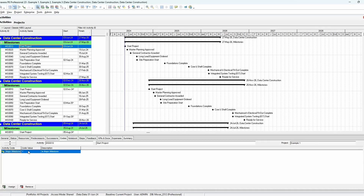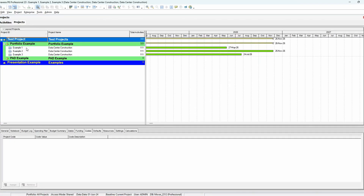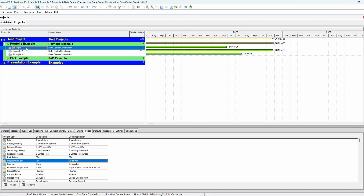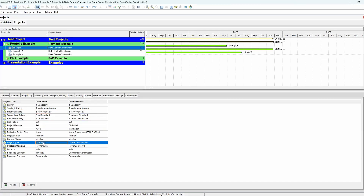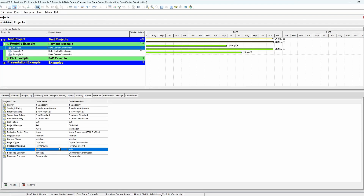Here's the project view in Primavera P6. If I select any one of these projects, you're going to see a whole set of codes that allow me to filter, sort, and provide juicy data that our portfolio would need. There are some really good ideas of what you can apply — for example, risk rating, financial rating, project type, strategic objective, and location. That's where going back and defining what you want your outputs to be is so important, because as you think through what you want to standardize, that will guide you to what codes you need in the system to pull this data out.